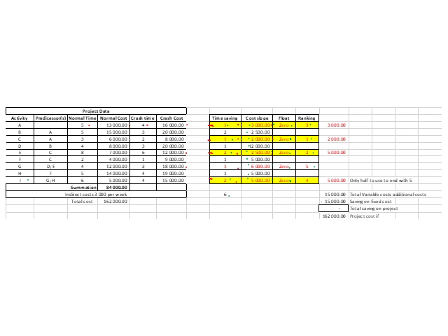Starting from our first ranked item, we can save 1 week, so we save 2,000 rand there. Then on our second ranked item, we can save 2 weeks, which has a cost implication of 5,000 rand. On our third item, we can save 1 week again, and it has a cost implication of 3,000 rand.